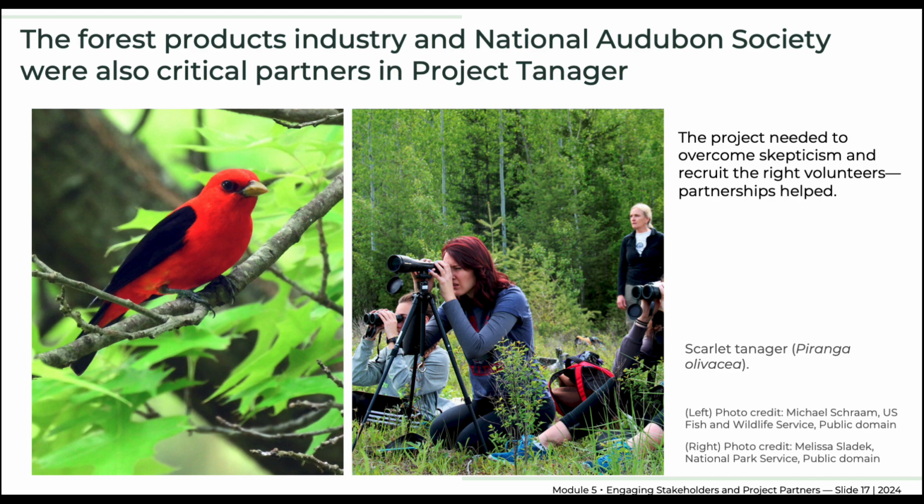Third, the organizers knew that recruiting birders with sufficient skills to conduct the protocols would be challenging. To recruit participants and to consult on project design, they reached out to other science and environmental organizations, including local and regional bird clubs and chapters of the National Audubon Society, for help in recruiting suitable observers. Finally, the organizers knew that skepticism about volunteer-collected data would rear its head for this project.